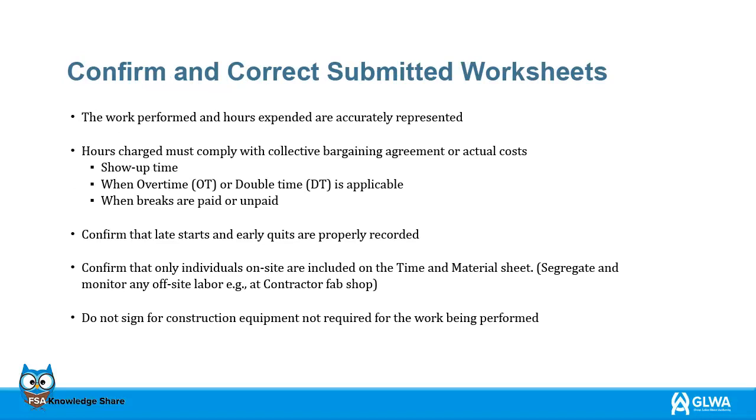Furthermore, GLWA site representative can cross-check GLWA daily records with the contractor's daily logs to ensure the following: the work that the contractor is performing and the hours spent are accurate. The hours that are being charged have to match the actual costs.